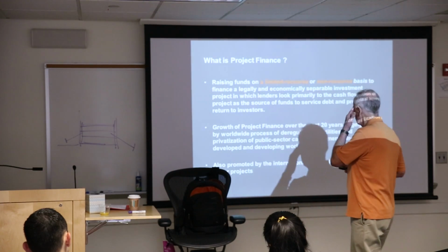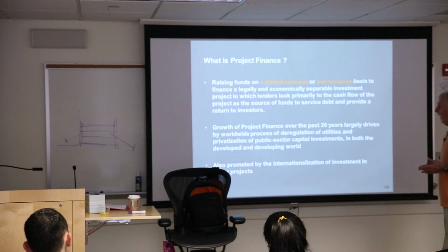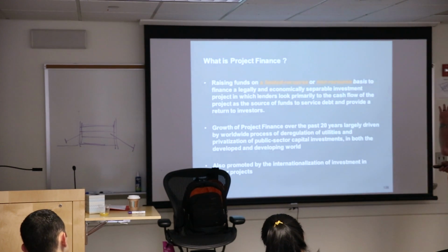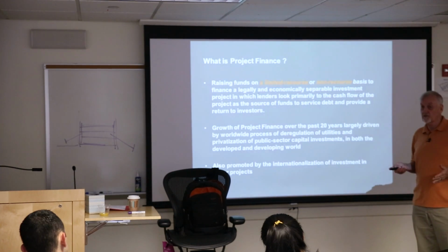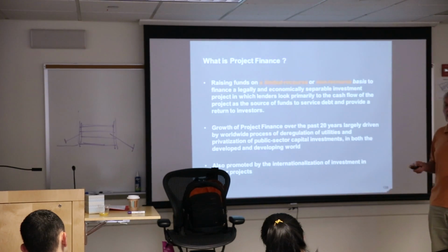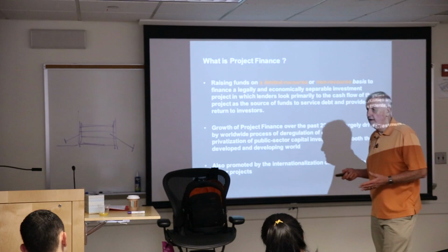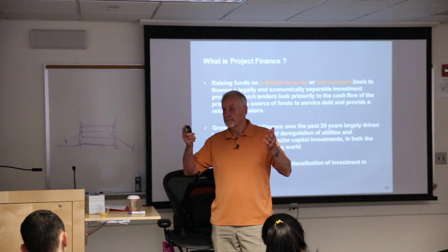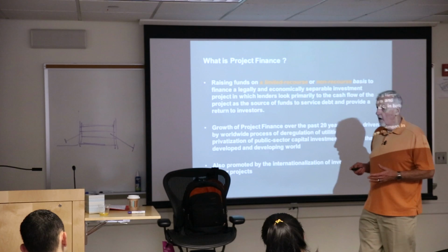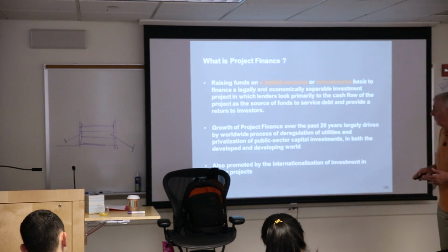And so you're raising funds on limited or non-recourse financing. It's a legally and economically separate investment of which the lenders are only looking primarily at the cash flow of the project as a source of funds to service debt and provide a return. So there's no underlying value to the land, there's no underlying value to the asset. I mean, who wants a power plant that defaults in the middle of some country in the world? Might be a liability at that stage. So traditionally, it's used in the mining industry, the petroleum industry, resource extraction, etc.